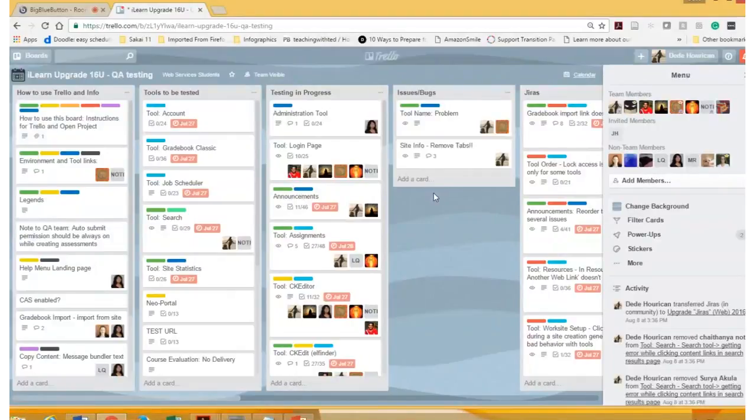The labels are like 1, 3, 7, 11. I think they're like a Fibonacci scale of how long it's going to take you to get that task done. So 21 is a month, and this is going to take me forever. 1 is I'll be done with this after lunch. So the student makes that decision based on that task.